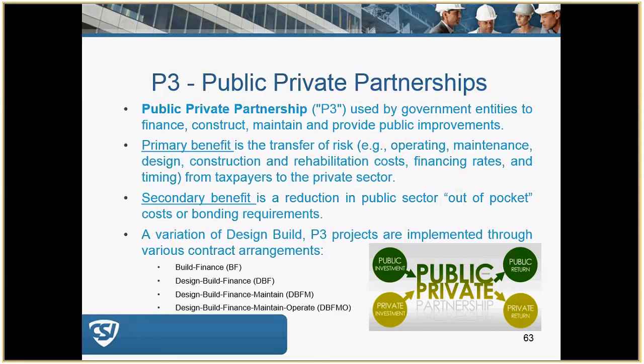P3 projects are implemented through various contractor arrangements. A key thing to remember is in a lot of these P3s, it's because the owner doesn't have the capital. And the design build firm is typically providing the capital, providing the funding associated with it. Lots of times the contractor will actually go out and get bonds or go to the bank, and often the design builder will simply lease the facility to the owner who will build it.